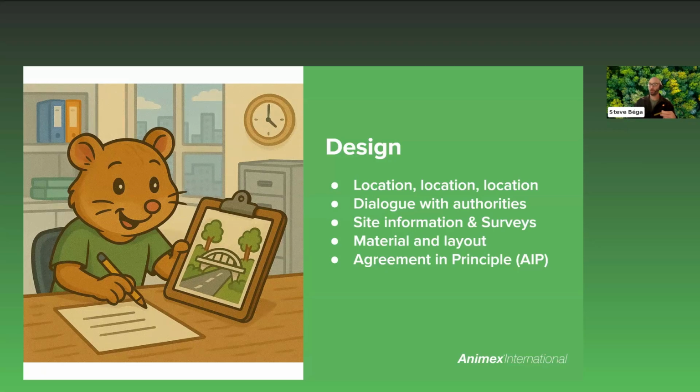And although the bridges that we supply, which were developed with the PTES since the initial research, are modular and consist of predetermined components that theoretically fit together like puzzle pieces, we can't simply stick them together and put them up over a road on demand. Each project requires detailed engineering to determine material types, the span, height, foundations, supports, and all of this in relation to habitat and individual site conditions.